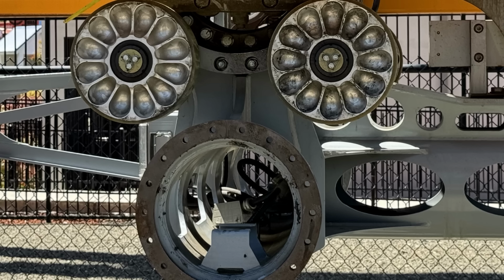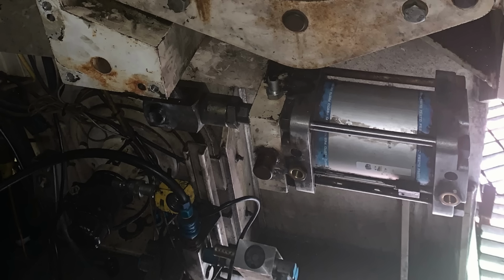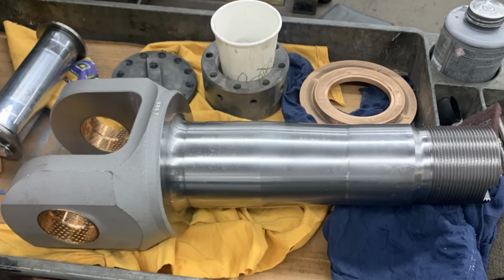And next is weeks of people washing things. All the parts, the pins that came out that are all greasy, they're covered in hair, grease, and everything else. Those have to be clean. They've got to be nice and clean before they could be sent out for NDT. That's non-destructive testing. So we take all the thing apart, we clean everything up really nice, and then all the pins go out in a huge crate. We take all the pins to a ride and we put them in a big crate and we send them